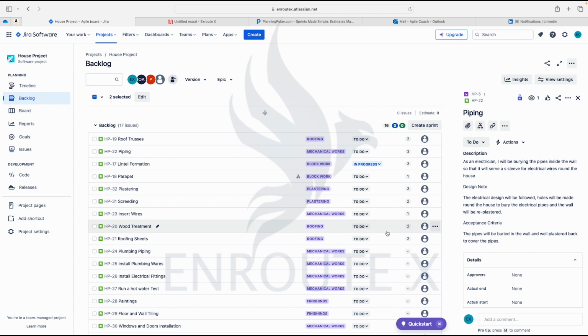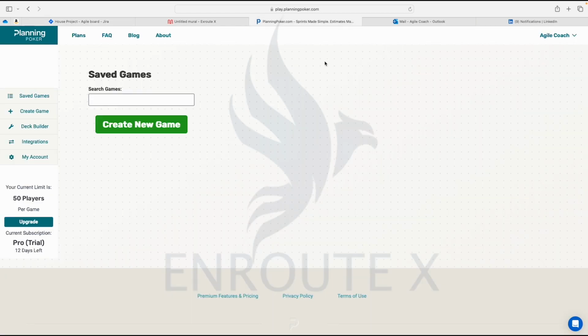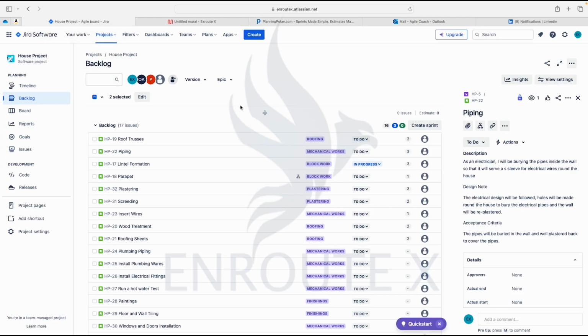Ideally, in sprint planning, estimation will be done with planning poker. I told us that in one of the previous classes. When we get to the practical, we will deal more with how to do planning poker. Planning poker is where all the team members come around and we look at each of the stories, discuss each of the stories, and then estimate how long that story will take.